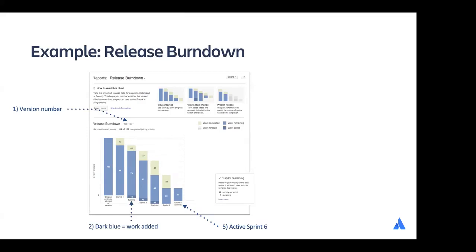There is the dark blue you could see in this report. We didn't see that with the epic. That's shown below the bottom line, which means that was work added. There's actually a way to click this in Jira to say you want to see things below the baseline or not. In this case, you can clearly see there's a dip beneath the baseline, which means that's work added. That's easier and helpful to spot the scope changes.